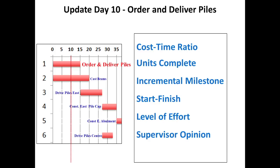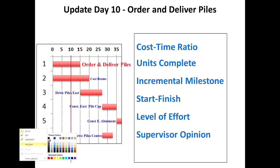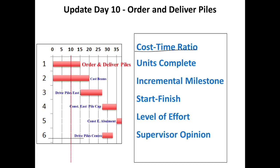Let us say we are on day 10 and we want to update the status of order and deliver piles. On day 10, we had put a question mark on the percentage complete. How will I actually measure percentage complete of order and deliver piles? One option is using the cost-time ratio — in this case, the time ratio. The activity duration is 15 days and 10 days are over, so the percentage complete is 10 by 15. You have to decide if that is a fair assessment. It might not be fair because we are assuming progress is proportional to time spent, which need not be the case. So this is not a very good indicator of percentage complete for this particular activity.